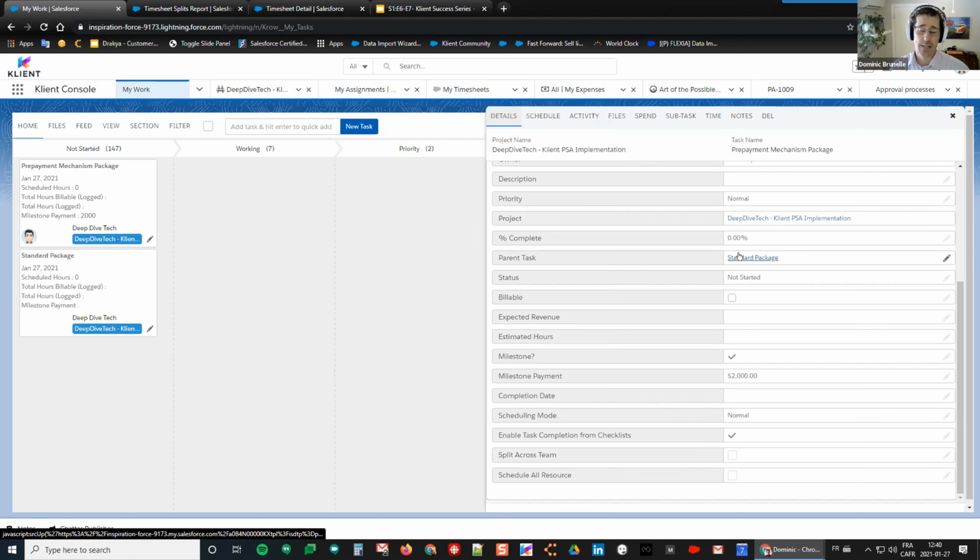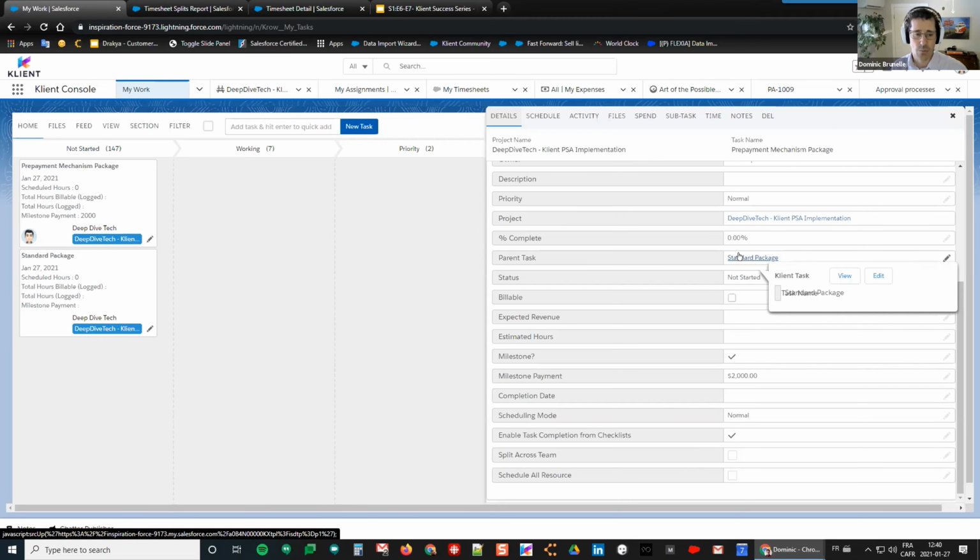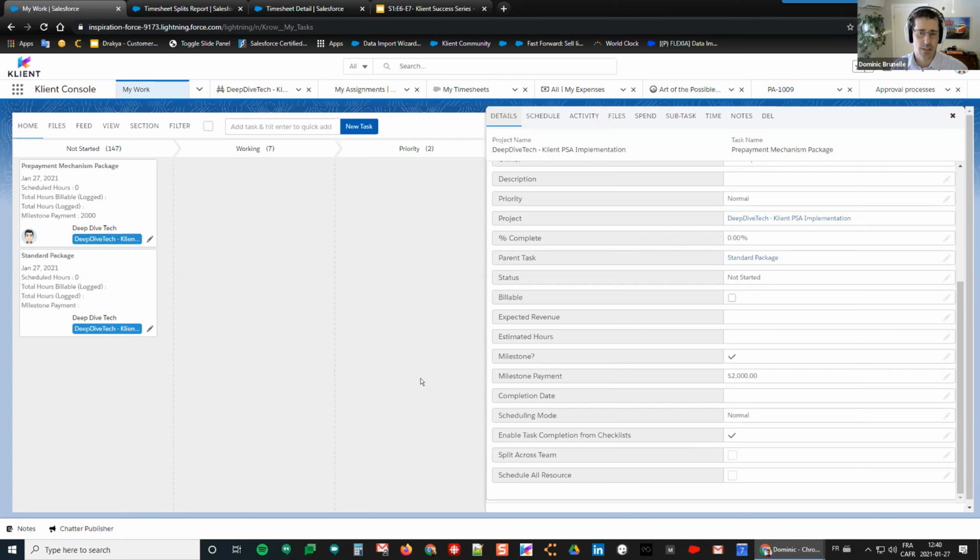Yeah. And just on the latter that you mentioned, there's a field that says percentage, so you could drive your milestone based on an expected revenue of the project, and you just have 30%, 30 and 40 or something like that. So that's possible instead of having fixed amounts.